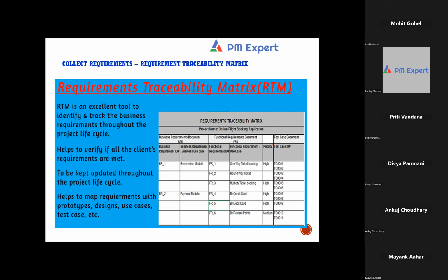So for example, if it is an agile project, then do you put in user stories in a requirement traceability matrix against a bigger requirement? Yes, you can. See, you can make it very simple, right? Map your user stories with a business objective and test scenarios. That's it.